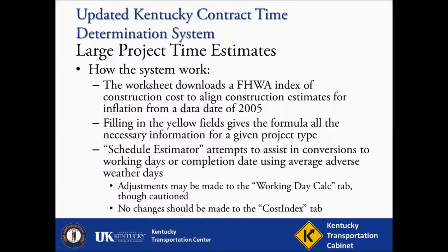An additional feature on each sheet is the schedule estimator. This area of the sheet attempts to simplify the user estimates even further by relating the contract time estimate in calendar days, completion date, and working days. It should be noted that the working day calculation was not validated within this research. It is merely an attempt to estimate a conversion of calendar days to working days using the average adverse weather days for Kentucky as a whole.